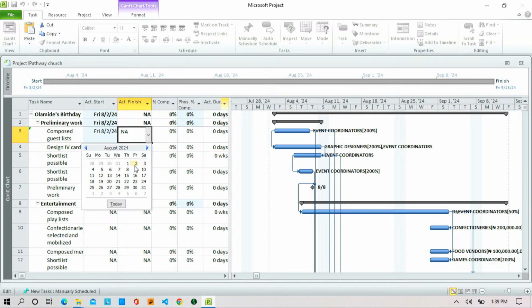It's not clear. Okay, listen, because you are doing something else. Okay, initially, we have done our schedule, isn't it? We have done our schedule, and we came to the fact that the project will take us 30 days and a half. That's the schedule. Then, in terms of cost, it will cost us 5.015 million, isn't it? 5.001 million. Now, we now baseline that. The client agreed, we agreed that this is what it will cost us. Then we baseline it. If there is no baseline, you can't measure performance.